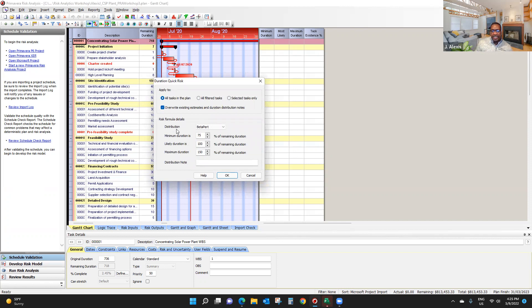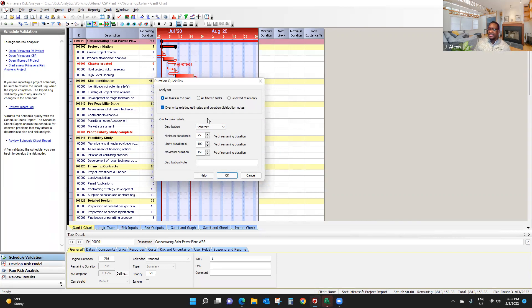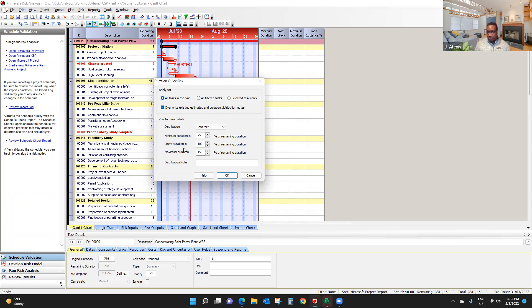Now, the distributions I have selected here is the beta pert. We found that beta pert is actually a very good distribution to model duration and uncertainty. We're going to leave the most likely duration the same. So they're going to be 100% of the information imported into the computer.